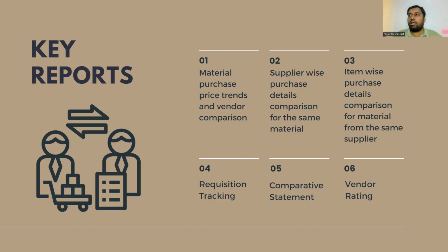Because if you don't have good relationships with another vendor, you've rejected all the vendors, and the present vendor is not supplying on time, has issues with delivery, has issues with the quality of the product, then if you disqualify this vendor and go for a new vendor again, the cost will be higher because the leverage is with the vendor now. You don't have the leverage now. Correct? So the vendor will quote higher. Hence, it is important to keep good relationships with the vendors. So this is how procurement works in construction projects.